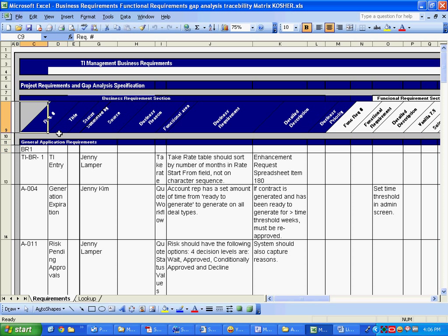Okay. Requirement number, requirement title. You should give it a formal title. Then status, whether the requirement is ready, things like that. Then the source, who gave you this requirement. Okay, who gave you this? Jenny Temper, she gave you the requirement. Business reason behind the requirement. When you're having the discussions, they'll give a reason why they need this. What is their pain point because of which you want this requirement, right? You have to enter this here.